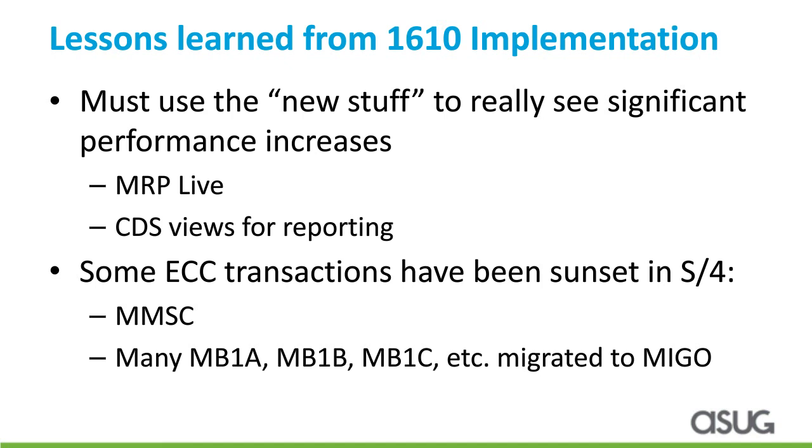And that added, it's been a while, what was that, 2 weeks or so? I think 2 weeks to a month. 2 weeks, 3 weeks or so to actually make that upgrade. So we chose to go ahead and do that upgrade because we knew when we launched, we would be N-1, which is really where we wanted to be. When Delta went live May 1st, one version behind, and N-1 is, I'm sure a lot of the peer ITSM folks in the room would agree with that.